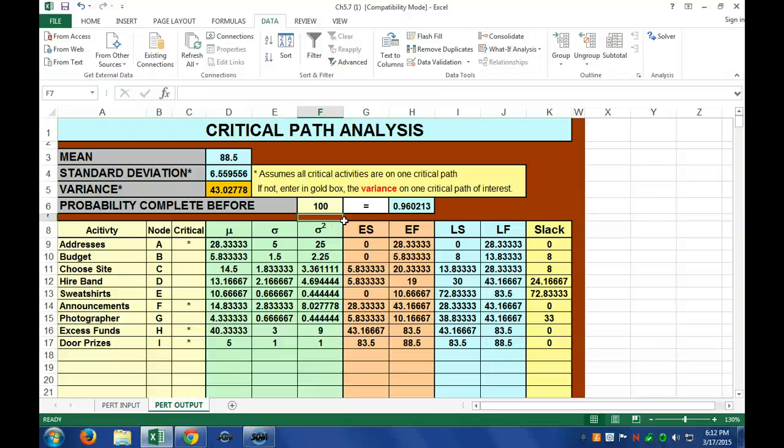And I can also now give better estimations to my superior, like, hey, this is what I'm saying for the project, but that's a 50% chance it's done with that. So if you want to know something that I'm 98% comfortable with, I'll have to give you a higher value, and I'll tell you what that value is. It might be 102 days, okay? Because we have to recognize that baked into every project like this, there is going to be variability. So this is more common than not, right? So any questions on that?